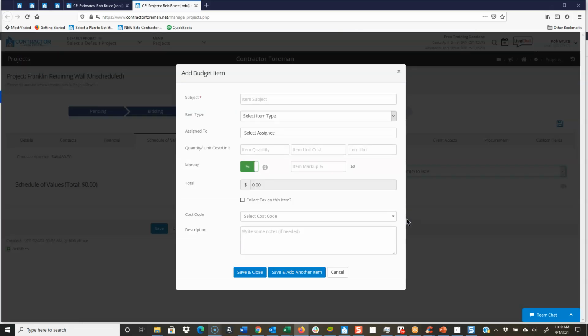Now, if you've used an estimate and created one, approved it, etc., then the system uses the estimate for job costing. And here I can just come up. I don't have to fill all of this out for doing a manual line item. This may be a case of where I'm going to create a schedule of values because they're going to give me a deposit. Again, if I'm using the estimate, I don't have to give it item type, don't have to do assign to, and I can just do 1. And the deposit on that job was $1,500. So this is going to be lump sum.